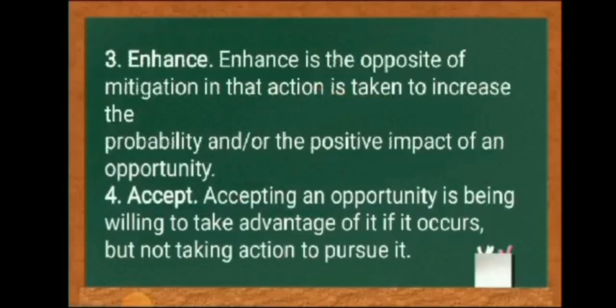Number three, enhance. Enhance is the positive equivalent of mitigation, in that action is taken to increase the probability and/or positive impact of an opportunity.